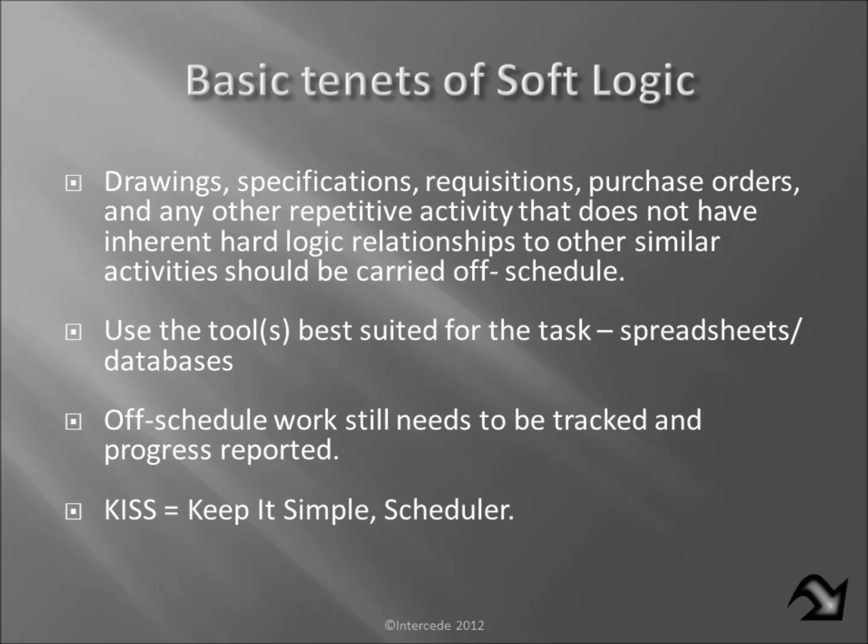And to do that, I think that there are other tools available for us that'll do a better job. And for me, it's spreadsheets for things like drawings and specifications and requisitions, and a database for things like purchase orders. Now, we do have to keep in mind that all off-schedule activities still need to be tracked in progress. So there's going to be somewhere in that schedule where we're keeping track of percent complete. So we're not losing any visibility necessarily. And I will try to convince you of this later. But again, basic watchword, less is more, and I'll leave you with this: KISS, keep it simple.